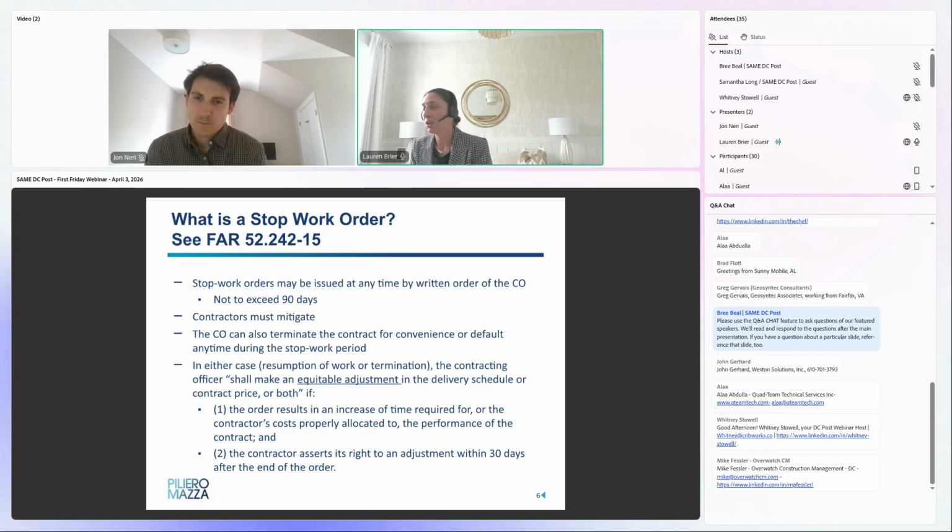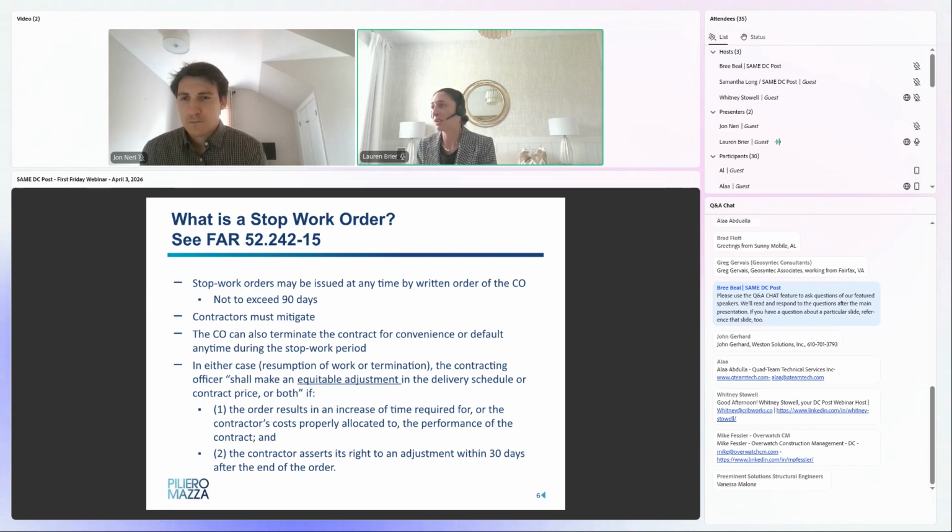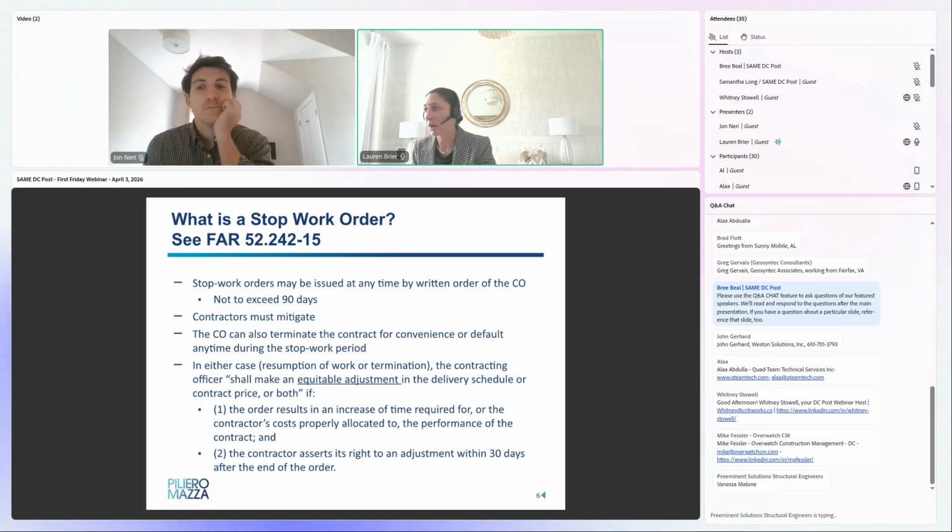What I would suggest is that you look to see if there are other contracts that you can put those personnel on. You may have to put them on leave, but you cannot just have them on the bench idling, incurring costs if there's a way to mitigate that situation. That's absolutely something that you need to evaluate. The same thing happens with equipment. If you have equipment in place and you could put that on another project, you cannot just let that cost incur. You actually have to mitigate the situation and try to see if there's a useful purpose for that equipment somewhere else. Those are just some instances to take into account when calculating your costs on a potential adjustment.